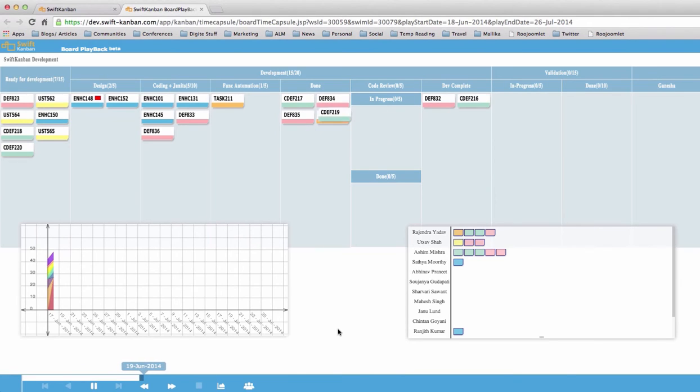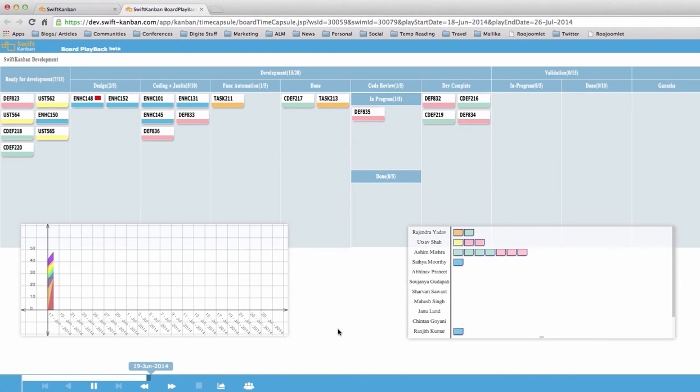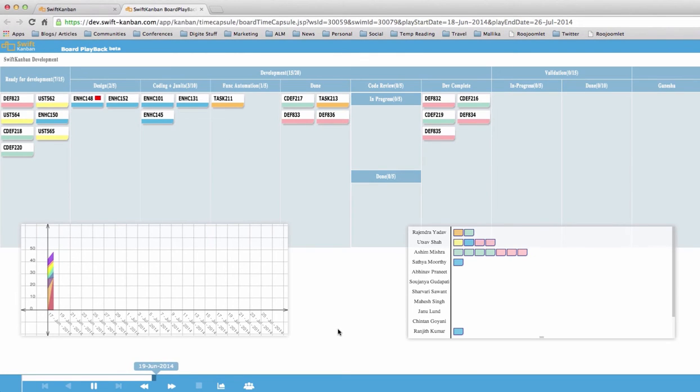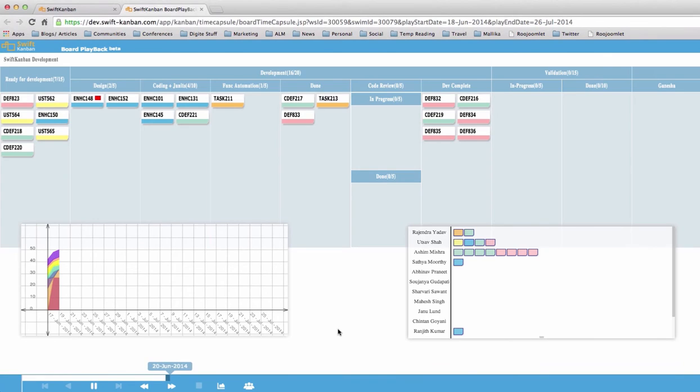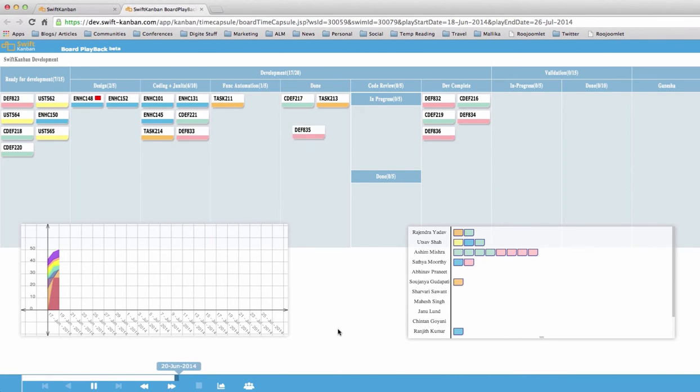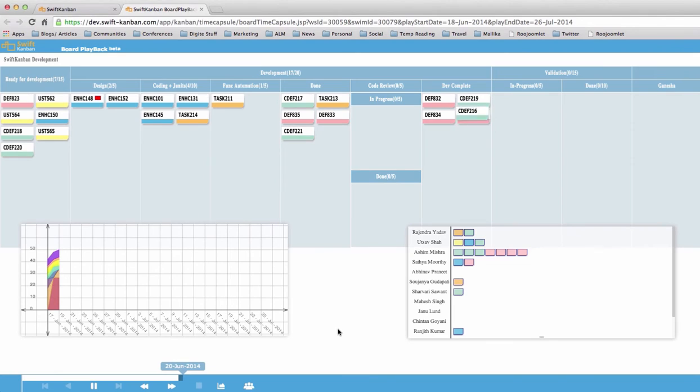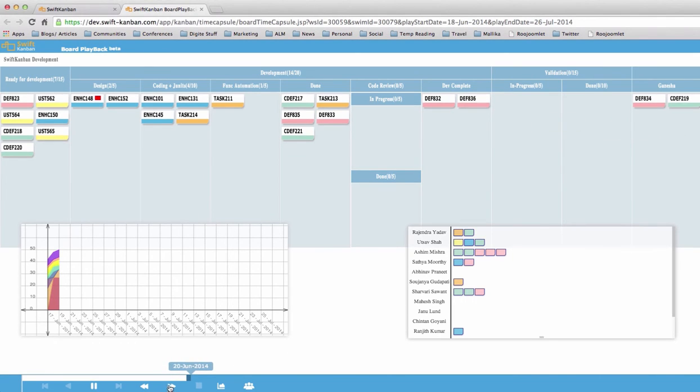Where did cards get held up? Which parts of your workflow might have bottlenecks? Where was WIP limit violated? Is the demand on your team too high? Which process step is not being followed? Perhaps your process isn't what you thought it was. Why were so many cards moving back? Was there a lot of rework? How fluid is your board?